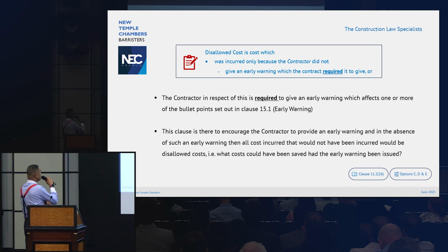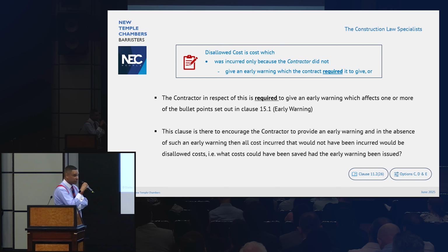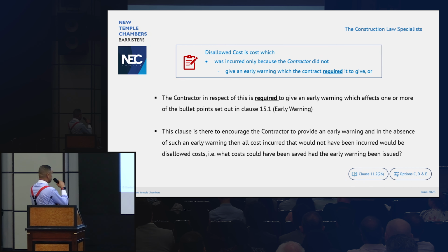This is an interesting one. Incurred only because the contractor did not give an early warning, which the contract required it to give. And the key word being required, which I've put in bold and underlined. In this respect, yes, it is to encourage the contractor to give an early warning, and in the absence of which, such costs may be disallowed. But the key word being required.